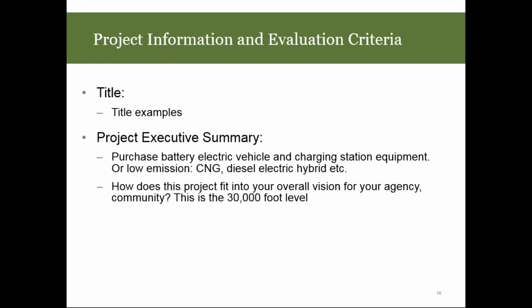Oh yeah, go ahead. This is Blake. I was just going to say, ours, we originally asked for 6 buses, and it was going to be a little over $6 million, and we received $3.9 million. Before we applied for the grant, we figured out a way to lease the batteries, which reduced the cost. So we were still able to, even before we submitted the grant.